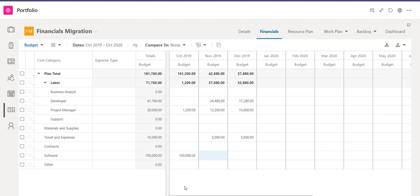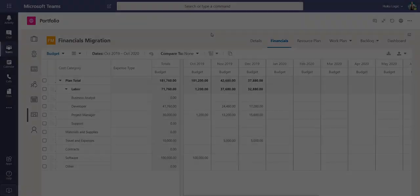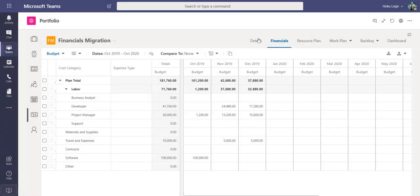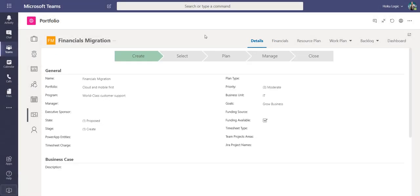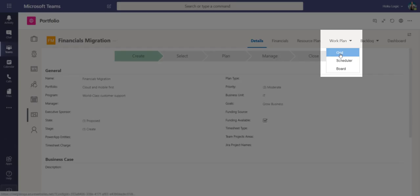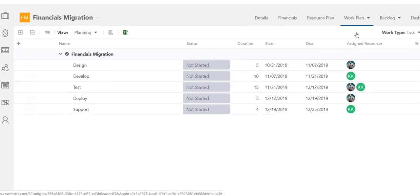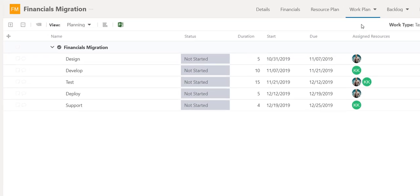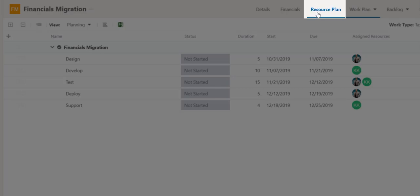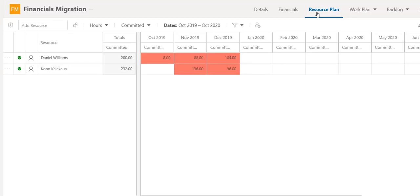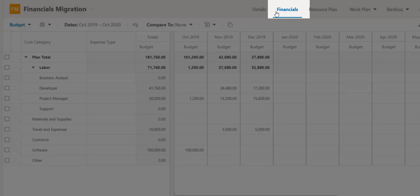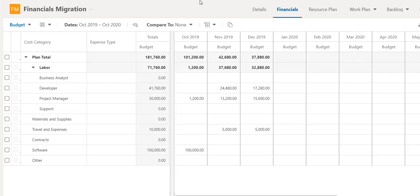This gives me my full picture of my project budget. Now I've completed the cycle. In review, I created a new project. I then used Project for the Web to build out the project plan, or schedule, which I brought back into OnePlan. Then I was able to build out my resource plan and the level of effort needed for my resources, and then also the financial plan, which included the labor costs based on that schedule.